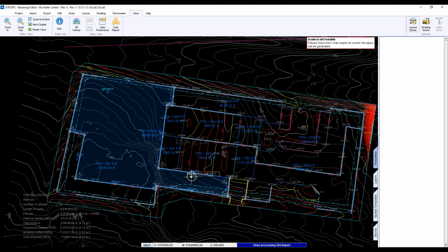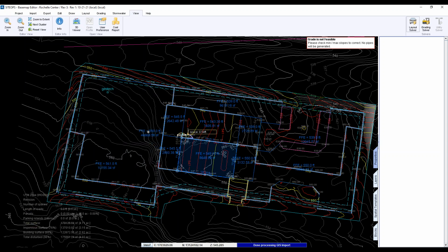Yeah, so that'd be a next step once we have gone into our due diligence phase and produce a Geotech report. Then we'd get the rock levels and plug those in, and then we'd update our estimate with that. Early on, we just put some general number we have used in the area. If we know nothing, because a lot of times we go through the first step, we don't know anything. But before we get too far along, we will know something. That's for sure.